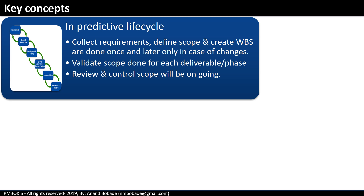Let's go through some of the key concepts. Scope management is done differently in predictive and adaptive projects. In a predictive life cycle, you collect requirements, define scope, and create the work breakdown structure — all done once, and later only in case of changes. Validate scope is done for each deliverable or phase, and review and control scope is an ongoing process.